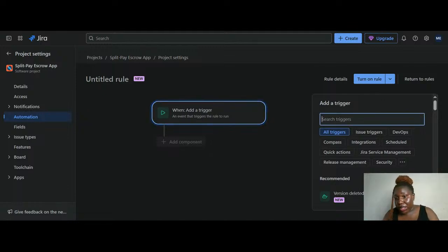In my company currently, I use Jira Automation because it works out for us. We have like 3 projects that are ongoing at the moment, and I can't be going around checking Jira to see who has moved a task, who is not done with a particular task. So I'll just create my automation. If this person is not done with this task on a particular date, send an email to my boss or send an email to the team lead, technical lead. And I mean, I'm off the hook. So that's just how it works.